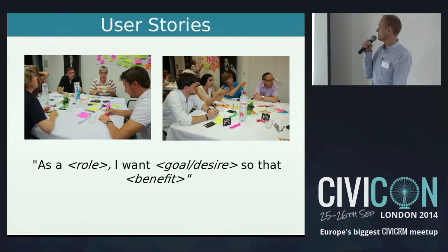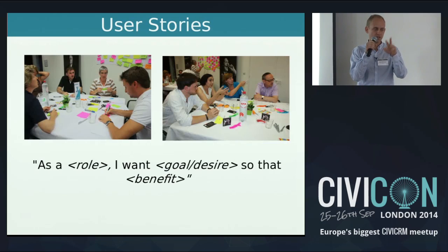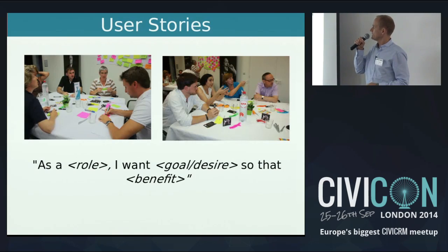Another user story could be, as a person of the administration, I want to see who subscribed to or registered for an event via the website, so I can check the details and then register the person. So we wrote these down on post-it notes, in a very informal way, and we did that in an afternoon, I think.